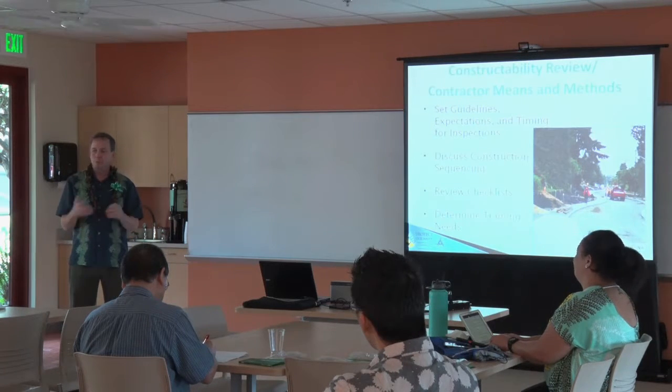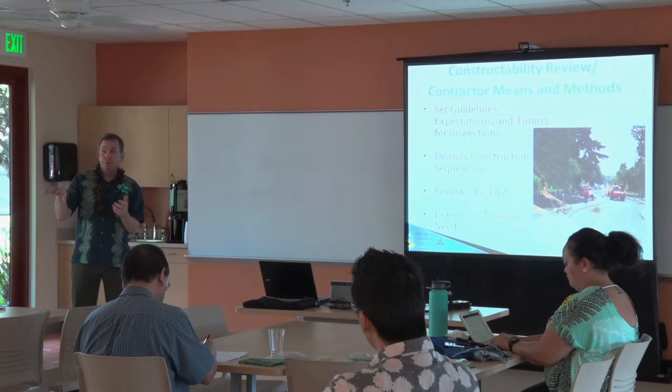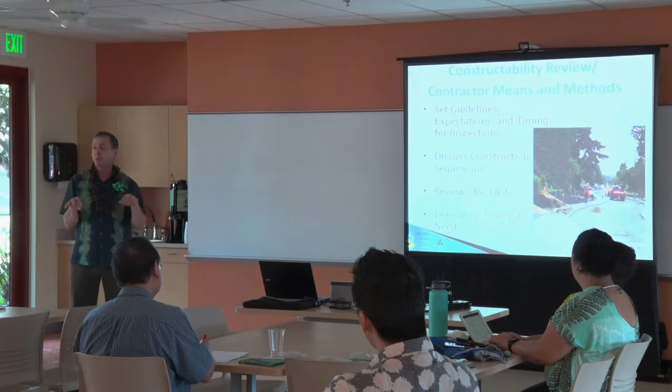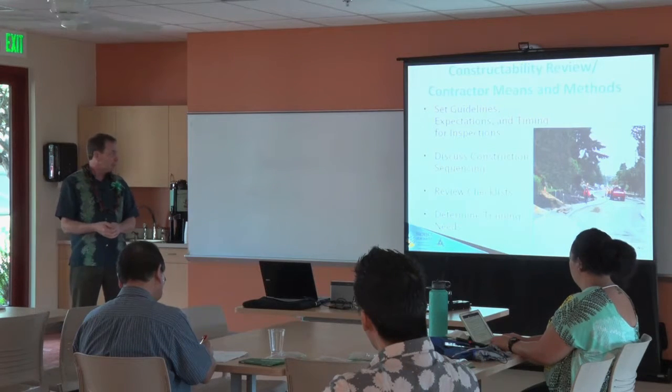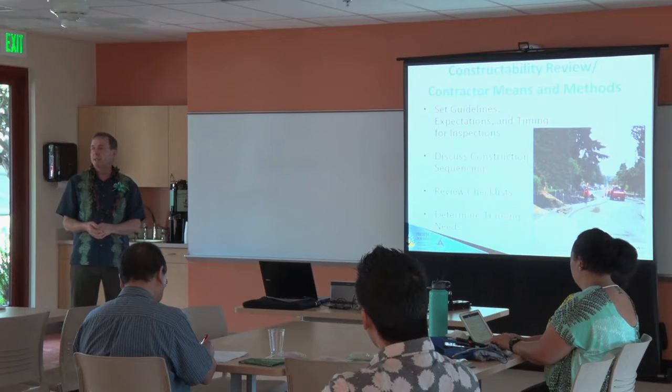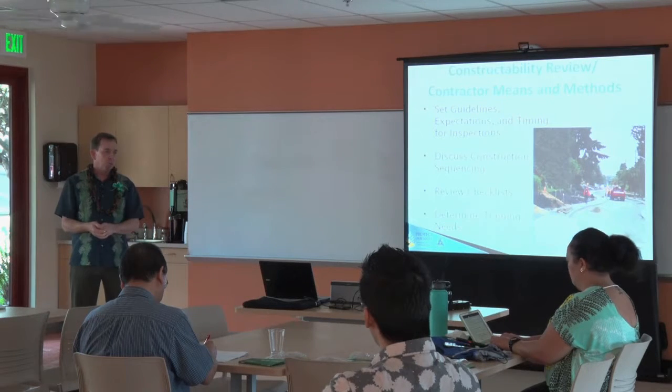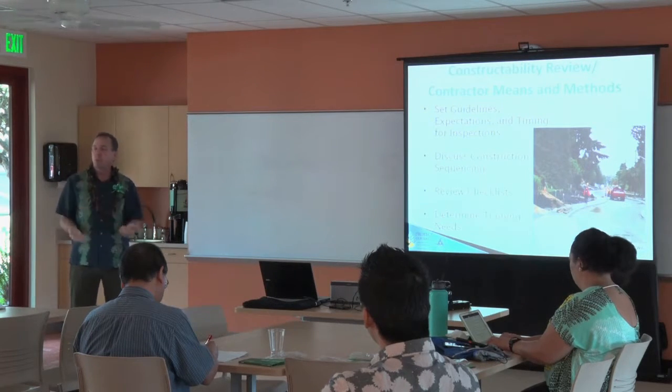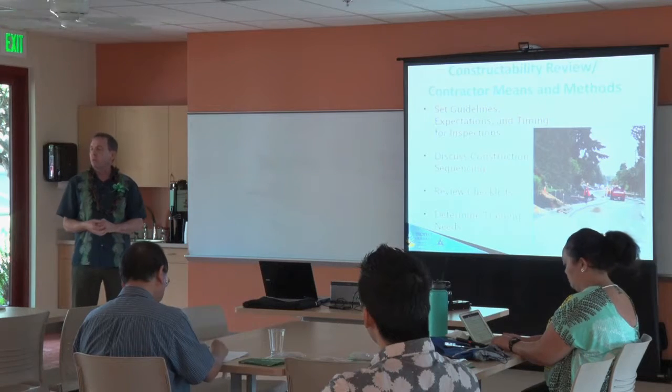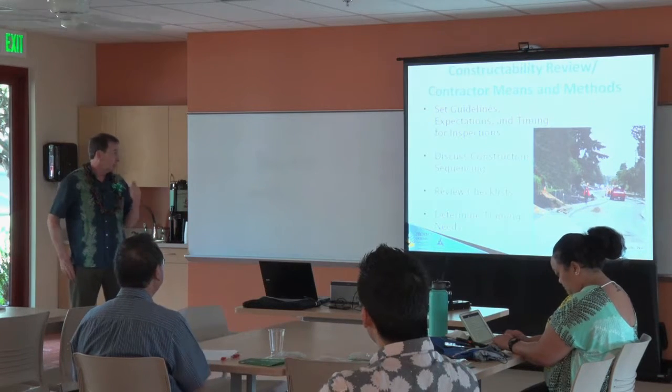So it may make more sense to build the rain garden after we build the road. So we talked to them some about construction sequencing, and it's building that partnership where we work with them to make sure we all understand what we're trying to do and how it goes.